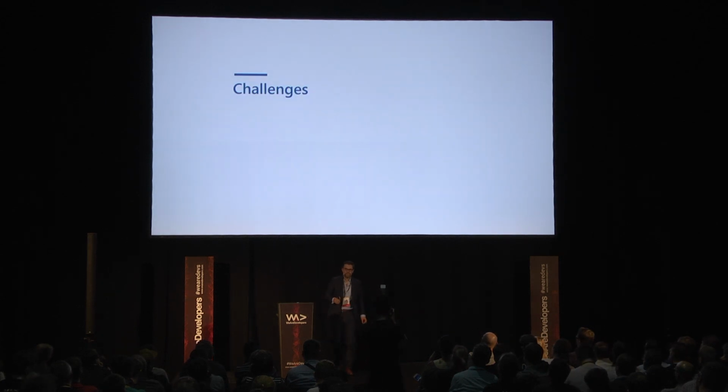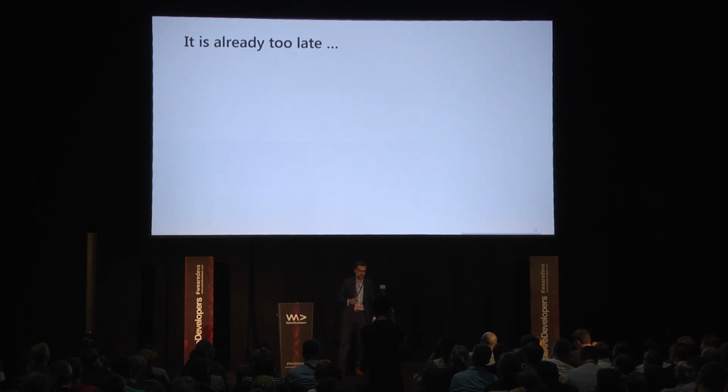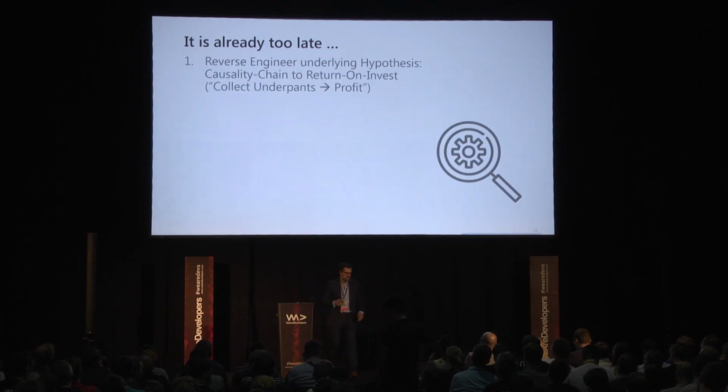Okay, so that was the idea, presented. Some challenges when applying it, I often call them excuses. The first excuse I often hear: it's already too late. We are building the system already, there's no time for this. So this is an exercise that takes, even for the largest projects, not more than a day, if you have the right people in the room, and you can get them sooner or later somehow. Because as soon as you have the wrong people in the room, you will realize that they cannot answer your questions and try to get the other ones.